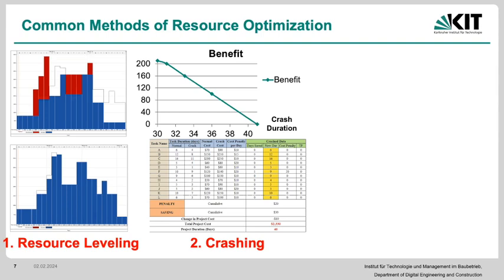Then we would be able to say, okay, there's no limitation on how much we can spend on a daily basis or on a unit of, let's say, time, monthly, yearly basis. Therefore, we can increase the number of crews and the capacity of equipment and various different aspects in order to meet or exceed the project deadlines, or crash it.